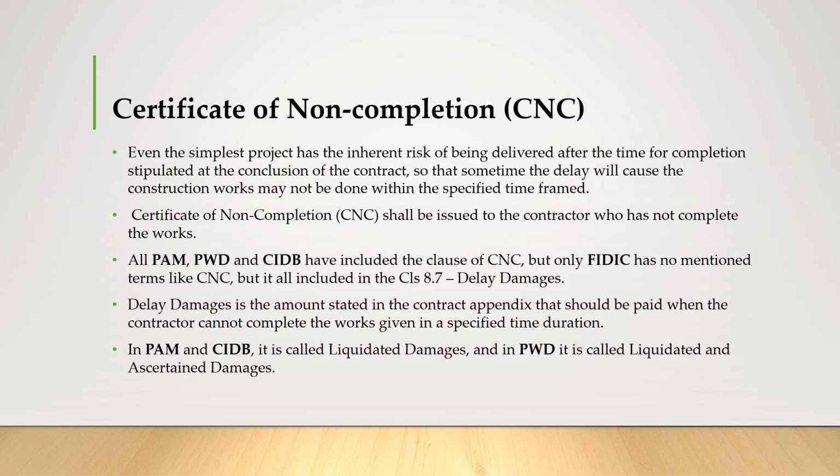Even the simplest project has the inherent risk of being delivered after the time of completion stipulated at the conclusion of the contract, so sometimes delay will cause the construction works to not be done within the specific time frame. So CNC, the certificate of non-completion, shall be issued to the contractor who has not completed the works. All of PAM, PWD, and CIDB include the clause of CNC, while FIDIC does not mention terms like CNC, but all is included in clause 8.7, delay damage.